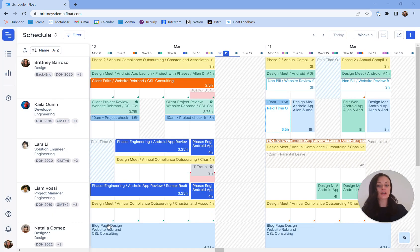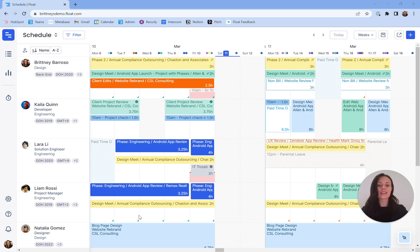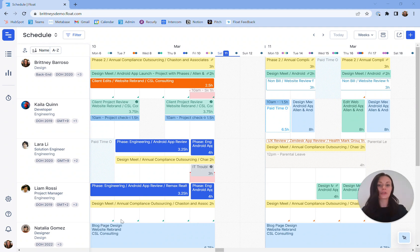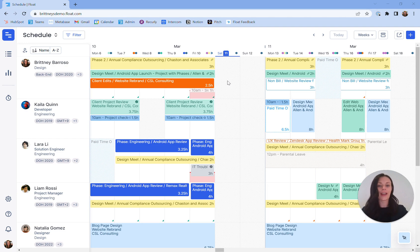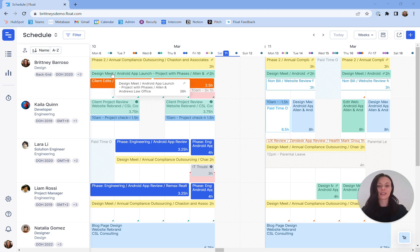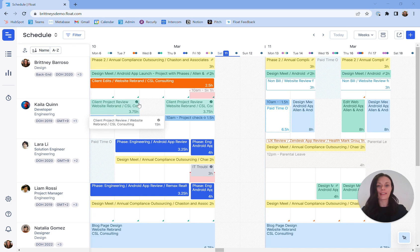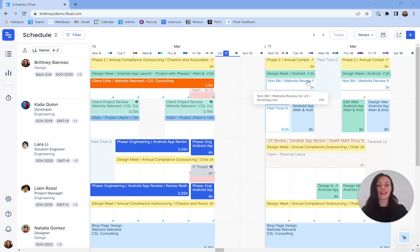Your team can choose to leverage statuses within Float. Statuses are a quick way to give your team an update on the schedule and they're fully customizable within your team settings. They'll be identified by the small triangle in the bottom right corner of a team's schedule. Finally, your scheduled project work will be indicated by three different types of work that you can quickly differentiate throughout your schedule. Confirmed work, completed work, and tentative work. You'll find that confirmed work is in your schedule as a solid color. Completed work is indicated by a check mark in the upper right hand corner and tentatively scheduled work is indicated by an outline.